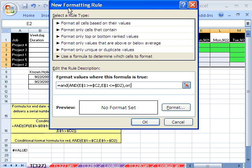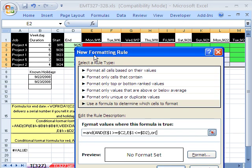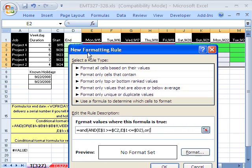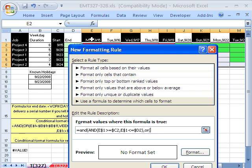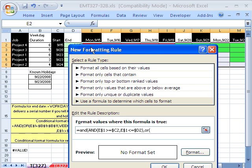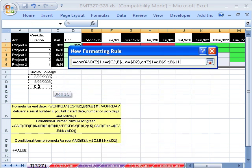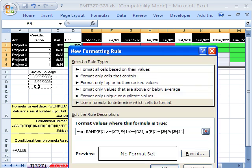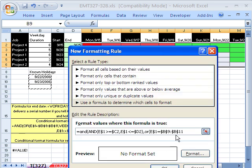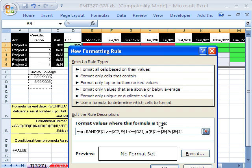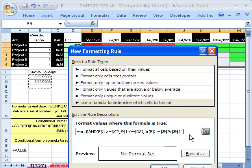So I'm going to say equals and. There's two conditions, so I'm going to Control-V on the first one. That means it's the project range, comma. Now we have to do an or inside of an and because there's three things. Any one of them come out to be true matched with this means it should be green. So we do or, and we'll do the holidays first. The active cell is right there, that red one. But we need this, and locked. I'm going to hit my F4 key so it's locked in front of the row reference. That is equal to any one of these as a range.